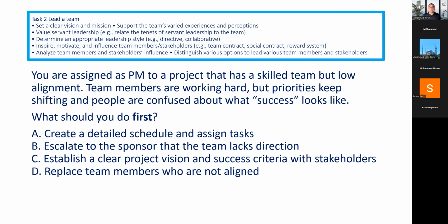Similarly, to manage the team, we discussed in our course that we have 5 types of power. As a project manager, you can manage the team with the help of expert power if you have expertise. If you don't have expertise, you can use reward power by rewarding the resources accordingly. If you don't have reward power, you can use formal power, which is called chair power, that your title is project manager, so everyone has to respect you. You can penalize the resources if they are not behaving well, so you can use penalty power, or you can use referent power because you are liked by the stakeholders. Your decisions are known among the stakeholders, so they respect your decisions. So you can use referent power to manage the team.